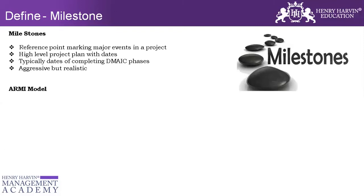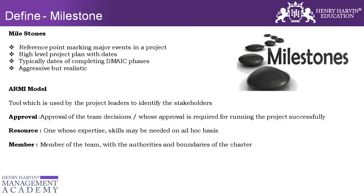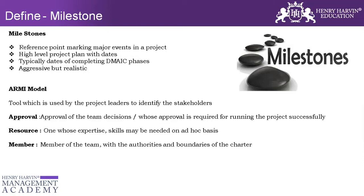There is a model known as the ARMI model, which is a tool that helps us identify the roles and responsibilities of each and every team member in a given project. A stands for Approval — the person who gives decisions and approvals at each and every stage, enabling the project to move to the next phase. R stands for Resource — a person who is not part of the project throughout the entire journey from Define to Control, but whose expertise is required on an ad hoc basis.